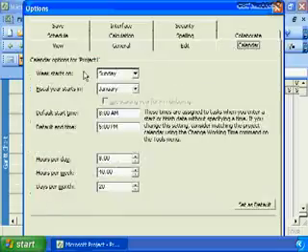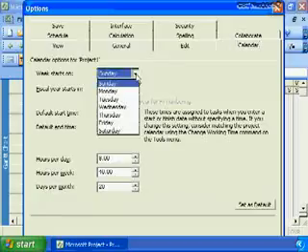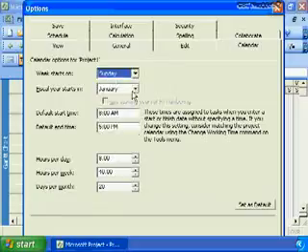In the calendar tab, you're able to define when your week starts, because some organizations start payroll weeks or start accounting weeks on a different day of the week than Sunday. Allows you to manage when your week starts. Again, allows you to define specific patterns for when your fiscal year starts, defines your working times, and most importantly, defines the number of working hours in a day in your organization, whether your team works an 8-hour day, a 7.5-hour day, a 7.25-hour day, or whatever the appropriate time.